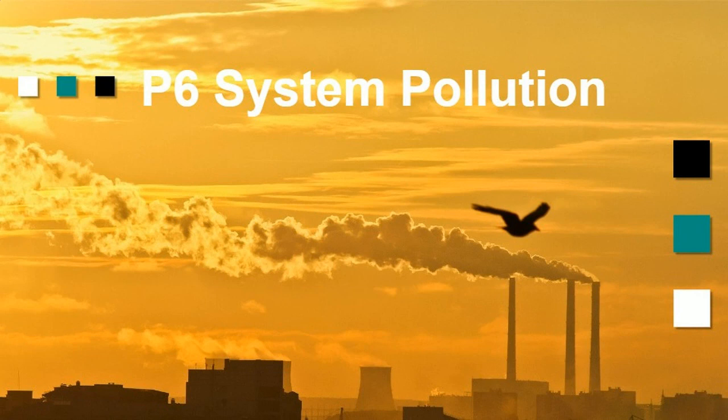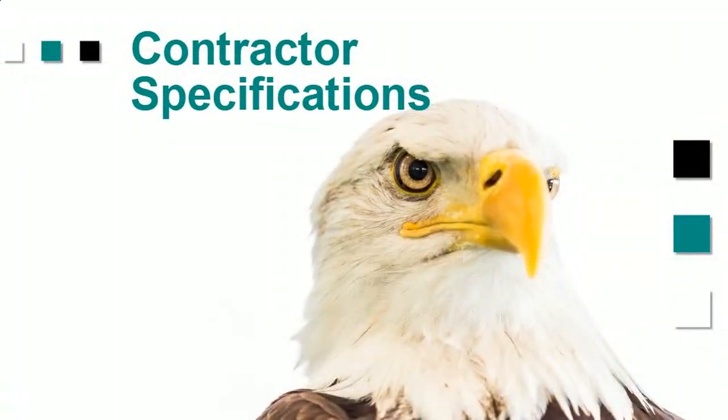There's no easy way out of the box to deal with it. When you have the import, you have some settings, but you don't have enough granular settings to control what's coming in. So that's why we built this P6-Scrubber, to give you much more functionality to control what's coming in. Now, you may have certain specifications that you've put out to your contractors as well, so there are rules, things that they have to include in their P6 schedule. It's going to allow you to make sure that that data is meeting the requirements that you've put together. Those are the main reasons that we did this.